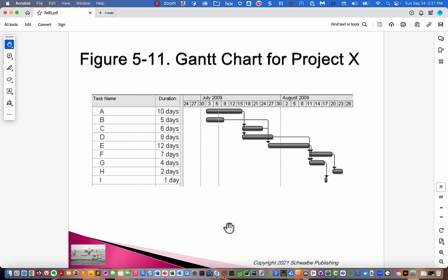Okay? Now that's the way people do it. They put the real dependencies into the schedule on the basis of how this could be done with infinite resources. Then they put the resources in and they level the schedule. Okay, that's a big pain in the butt to do, but it does actually work, and it pushes your schedule way out to the right. Okay, and then you get into conversations about, well, how many programmers do you need? It's like, well, you've given me 3 and we're getting done in 3 years. Maybe you've got to give me a few more, right?